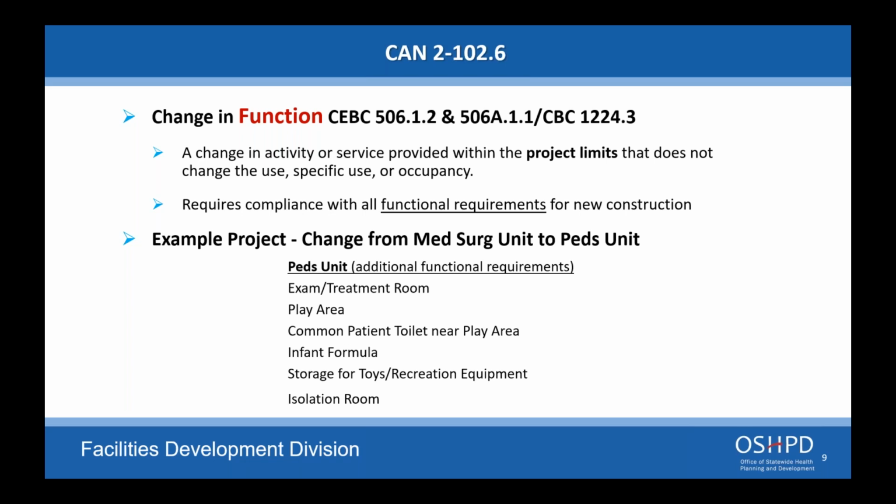So we want to know, does the PEDS to Med-Surg zero construction cost change require a permit? Yes, all projects would require a permit. But basically what I call it is a conforming permit or a conforming project. It's the same thing if you're doing a removal from acute care service. You may not have any construction, but you need to show compliance.